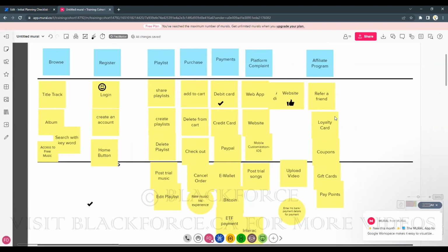So what you want to do now as a team is estimate these stories. You have all these epics and these stories. Now you want to estimate how long each story will take. What you are doing now is called high-level estimation. You are estimating for your initial backlog. But as you go along, as the sprint starts, you are still going to be estimating by sprint. But right now, you want to estimate all your stories.